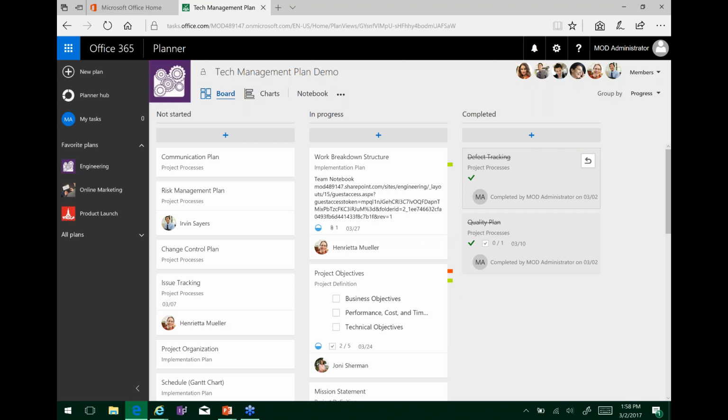Yeah, okay. What I would do in that situation is I would create a planner that is only for the customer and then a planner for your internal team. You wouldn't be able to, right at this point, set up different permissions of what people can see, because what people can see is the whole planner if they are a member of it. That's how they get access to that plan. It's all or nothing when it comes to access to an actual planner.